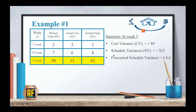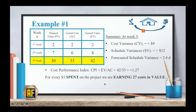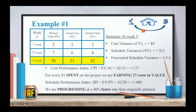I've summarized the cost variance, schedule variance, and forecasted schedule variance. Now we can calculate the cost performance index, CPI, which is earned value over actual cost: 42 over 33 equals 1.27. This means that for every dollar spent on the project, we are earning 27 cents in value, which is really good. The schedule performance index, SPI, is earned value over planned value: 42 over 30 equals 1.4, which means we are progressing at a 40% faster rate than originally planned.